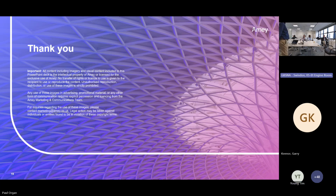Yeah. So the higher strength came on a project specific foundation design. When I started on the project, obviously we were looking at master series design requirements, which is a lot less. And I made the decision to go for the higher strength because when you're looking at two concrete designs, I went for the higher strength rather than the lower strength. In hindsight, I would probably challenge that requirement a little bit at IDC and at design reviews just to see if that is definitely a requirement that's needed. So yeah, in hindsight, I would challenge that.